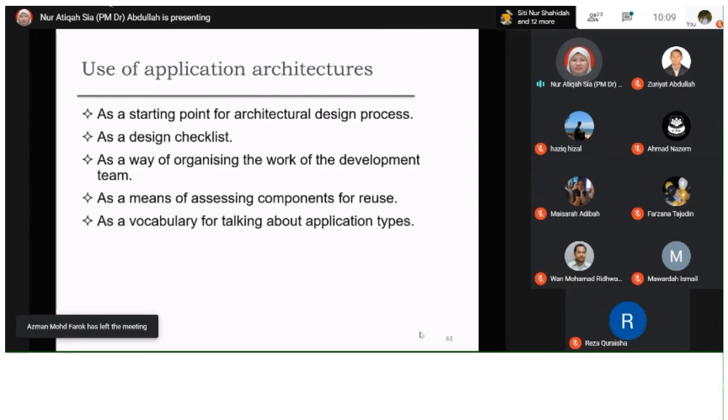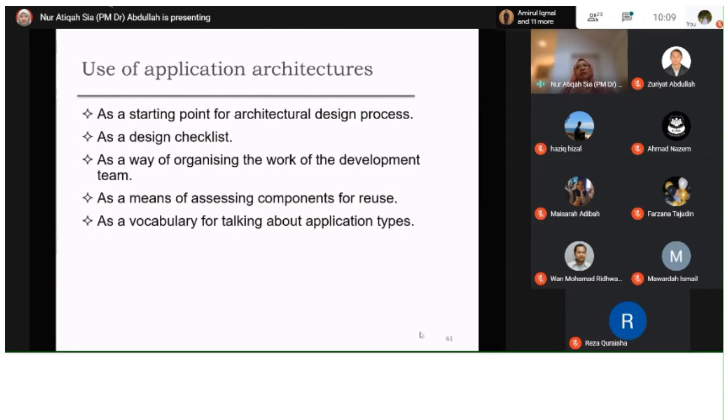And then satu lagi cara adalah at the end. Maksud you kira the whole things 60 hari you plus 5 days. Itu adalah cushion lah, letak kat situ supaya you dapat deliver and estimate what will be the deliver times or development times to give it to your company untuk deal dengan klien. Okay, so that's why that is the importance for you to identify the critical path yang ada. Betul?